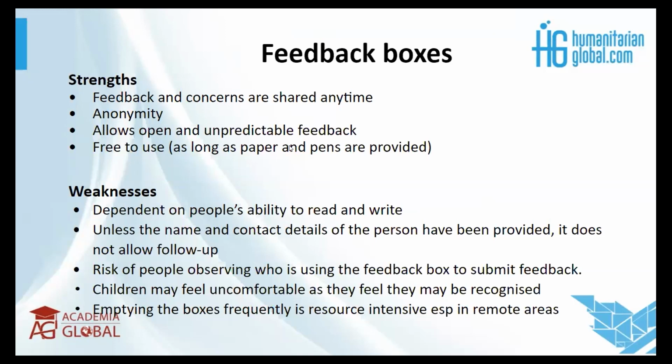That also especially applies to children in the schools. Then always emptying the boxes is a resource intensive activity, especially in remote areas, because this means that you always have to have vehicles to take the staff around to collect all these notes. And then, this is also maybe a daily thing or every other day. That means that the staff has to be really dedicated on this particular activity.